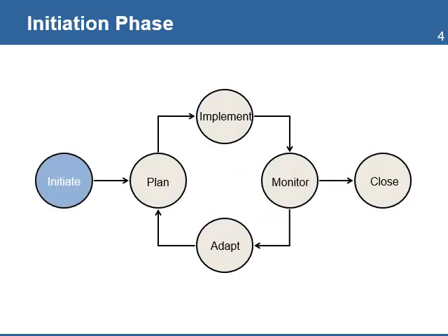The initiation phase is where a project proposal is authorized and funded as a project. It may include some initial planning and estimating to clarify its objectives and scope. This is the start of the project management cycle. Some work may have been done before this phase that included the design of the project. The cycle only starts once a project is approved and has funds to use.